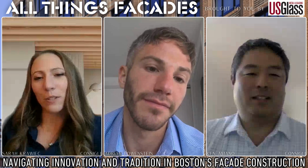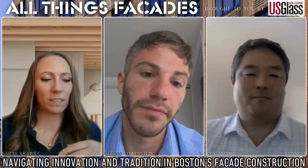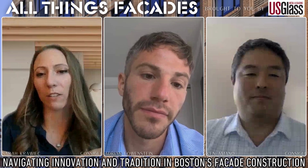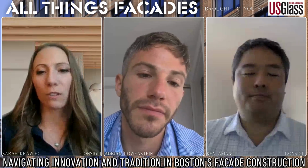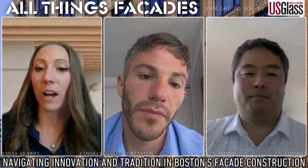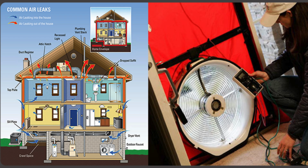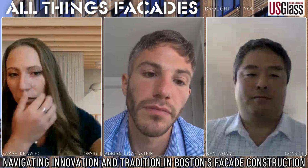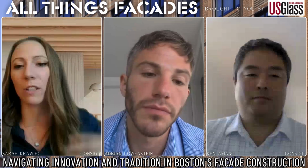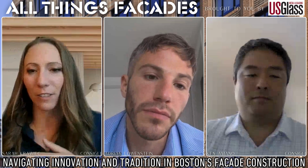Well, I can't necessarily speak to owners wanting to buy into it or not, but I do say that once that decision has been made, right, there is a ripple effect in what follows in order for us to plan for it. So we are seeing more passive house standards being used. For example, like the blower door test and a greater emphasis on building commissioning and testing the assembly as a whole, right? So it may not be passive house certified, but we are still using those means and methods to have high performance buildings. Does that answer part of your question?